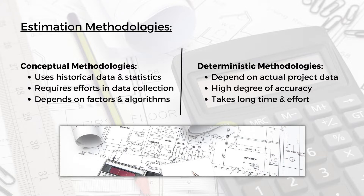The conceptual methodologies use historical data and statistics, because 'conceptual' means it is not highly accurate. You are using parameters, historical data, and statistics to produce an approximate value for the project. This is useful when the scope definition is very low or the scope is not fully defined yet. It requires effort in data collection but does not require quantity takeoff or gathering market prices. Instead, it depends on factors and algorithms derived from past projects.